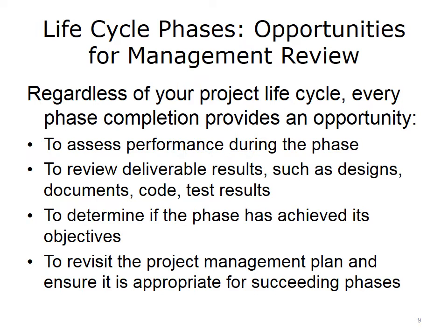One particular opportunity is performance assessment. As the project manager, you need to take charge and assess the performance during each phase. Ask yourself, what happened? What was planned? What were the objectives of the phase, and were they achieved? What about deliverable results? Deliverable results really define a phase, and each one is pointed for a particular outcome or result. What are those tangible deliverable results? Whether they're designs, documents, processes, or prototypes, it's an opportunity to determine if the phase has achieved its objectives.